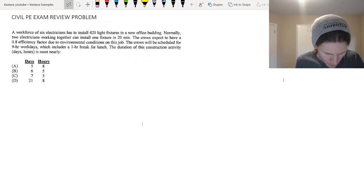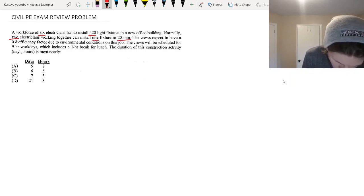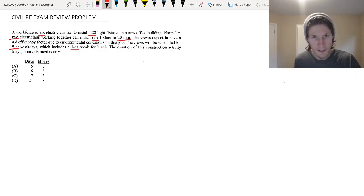We have a workforce of six electricians and they have to install 420 light fixtures in a new office building. Two electricians work together and can install one light fixture in 20 minutes. The crews expect to have a 0.8 efficiency factor due to environmental conditions on this job. The crews will be scheduled for nine hour work days which include one hour breaks for lunch. The duration of this construction activity, days comma hours, is most nearly what?